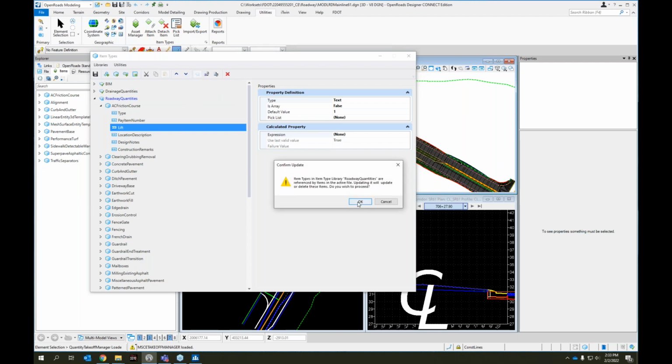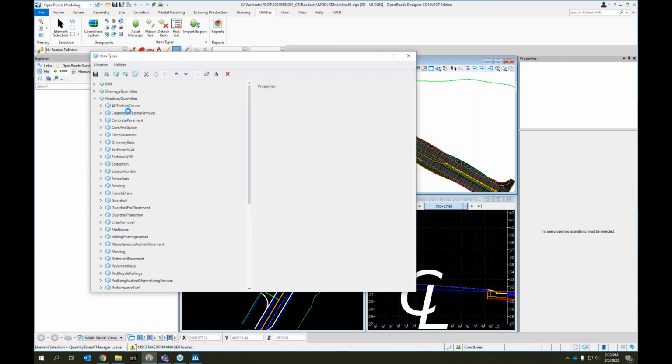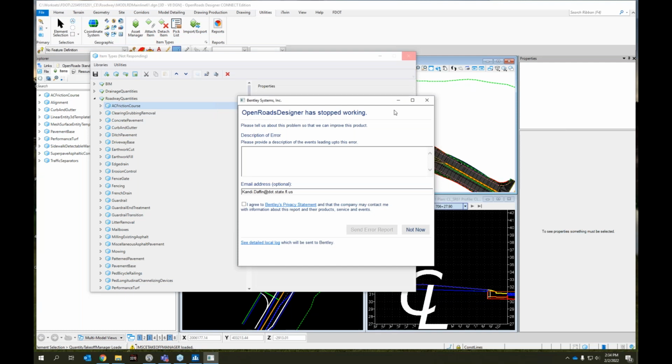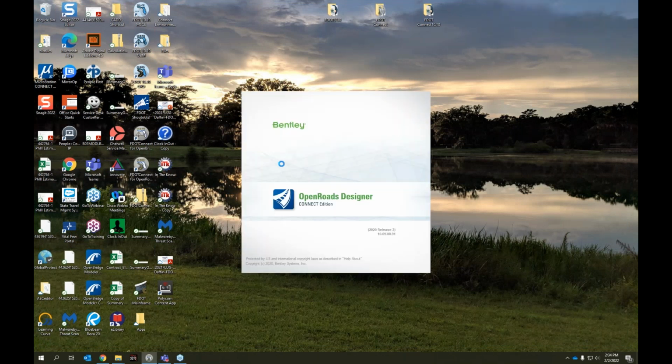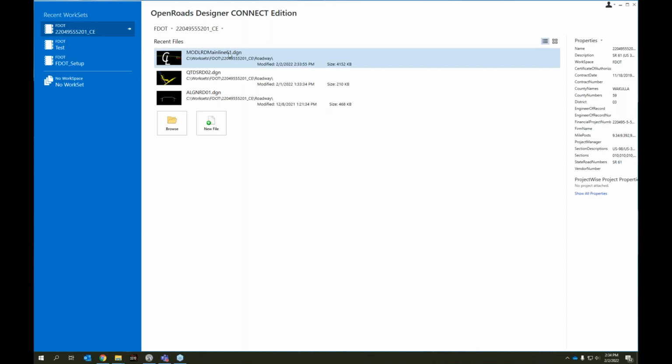And I will reiterate that this only affects the 2D aspects of this. If you already had that assigned in files that were 3D models, it would not affect your quantities because for 3D meshes, it pulls the volume from the mesh rather than the 2D area multiplied by that thickness value. So essentially, for 3D, it ignores that thickness. Okay, so that's one thing that I wanted to cover.